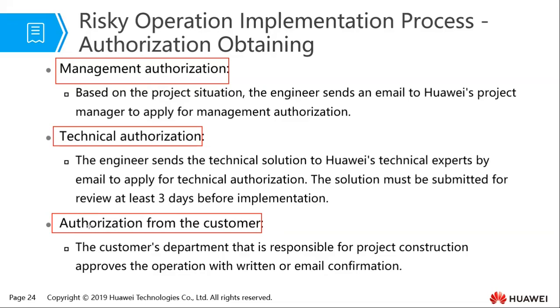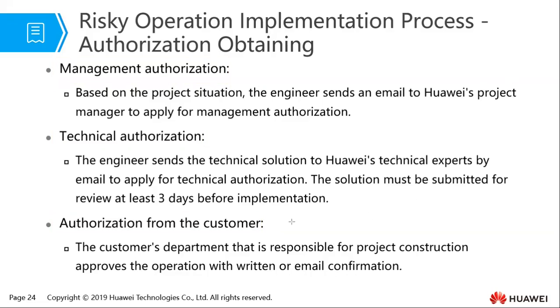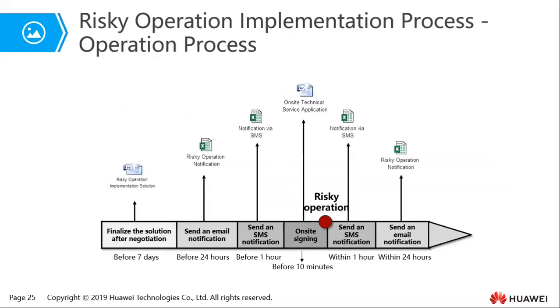Lastly, you also need to obtain authorization from the customer. The customer's department that is responsible for the project construction will approve the operation with written or email confirmation. So always make sure that you get that from the customer, a written or email confirmation.